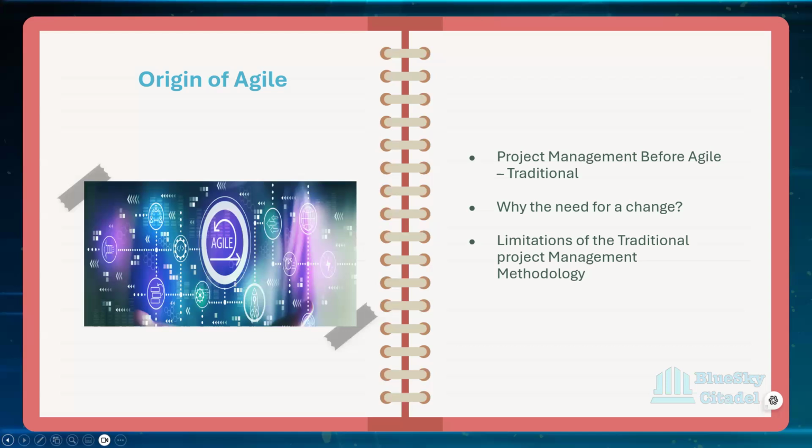So waterfall wasn't really valuable, and one of the problems faced during that time was late discovery of issues. By the time the implementation is done, the developers are finished with what they're doing. That's when the testers start testing.